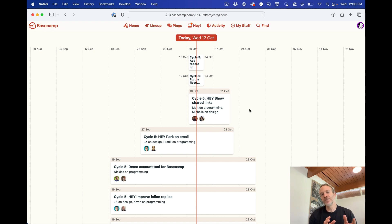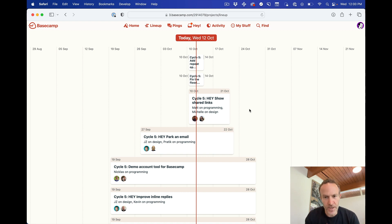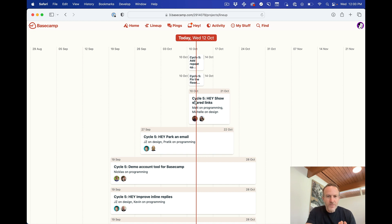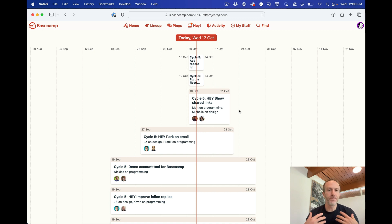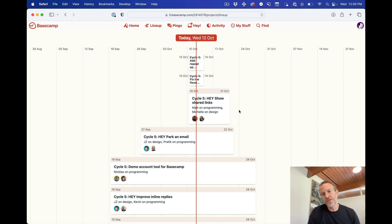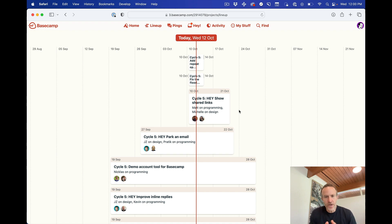So at a quick glance, I can get a sense that I know that this project's being worked on, and that we're maybe 10% of the way through the time allotted. This doesn't show you how much of the project is actually complete. This isn't measuring work done. This is measuring time past. So we're 10% of the way through roughly.